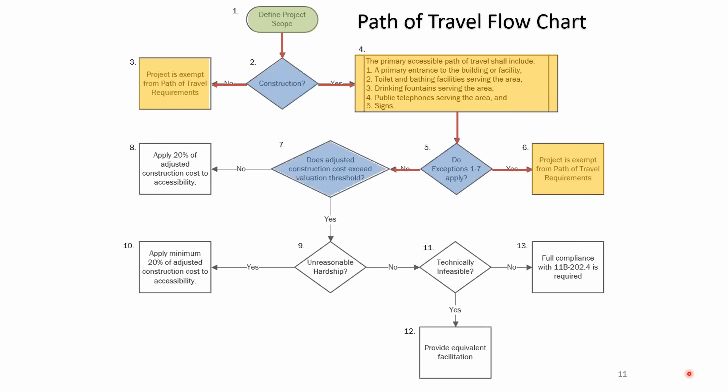If you don't qualify for exceptions one through seven, there are more exceptions. Box seven asks: does the construction cost — the adjusted construction cost — exceed the valuation threshold? As of last year, that amount was $172,000. If your project is above or below $172,000, it either kicks you to an exemption in box eight, where you're obligated to spend at least 20% of your construction budget on accessibility features.